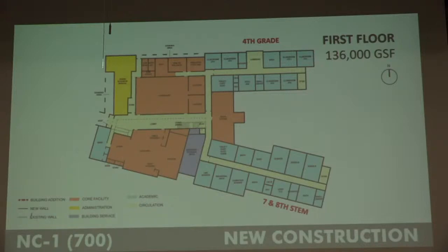Is there anything available in the market that you didn't include because of cost? We didn't carry the cost of, like, bulletproof glass. That's a conversation as we go forward. There's other efficiencies. I can't say we didn't include it, because some of our costs now carry quite a bit of design contingency, escalation, other things. So we may be able to buy them at the price range we're showing, or maybe even on the higher range of the price range you're going to see.